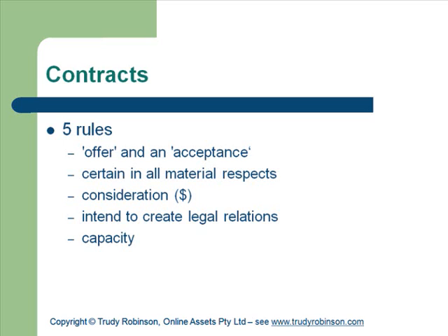So what I'm saying is, in the contract you must be very clear in what your material aspects are that are going to be involved in the contract. The third is consideration. A contract that has no consideration, which is an exchange of something in payment, is not subject to contract law. So again, the consideration is really open to interpretation. So if you are given a piece of paper in consideration for your house, then somebody could argue that that was consideration because you agreed to it. But normally it's monetary based, or an exchange or a barter of something.